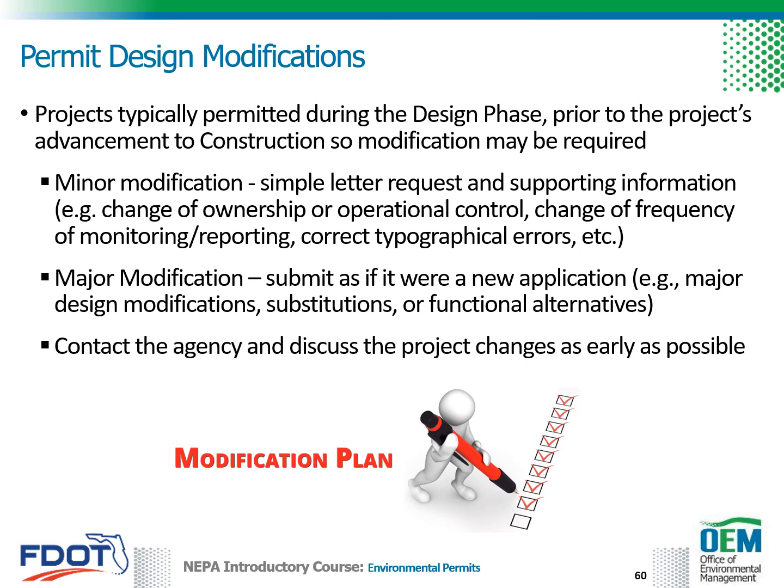A major modification would include such things as major design modifications, substitutions, or functional alternatives. Regardless of the level of change, it is important to contact the appropriate agency and discuss the project changes as early as possible to allow reasonable time for the agency's permit modification review.